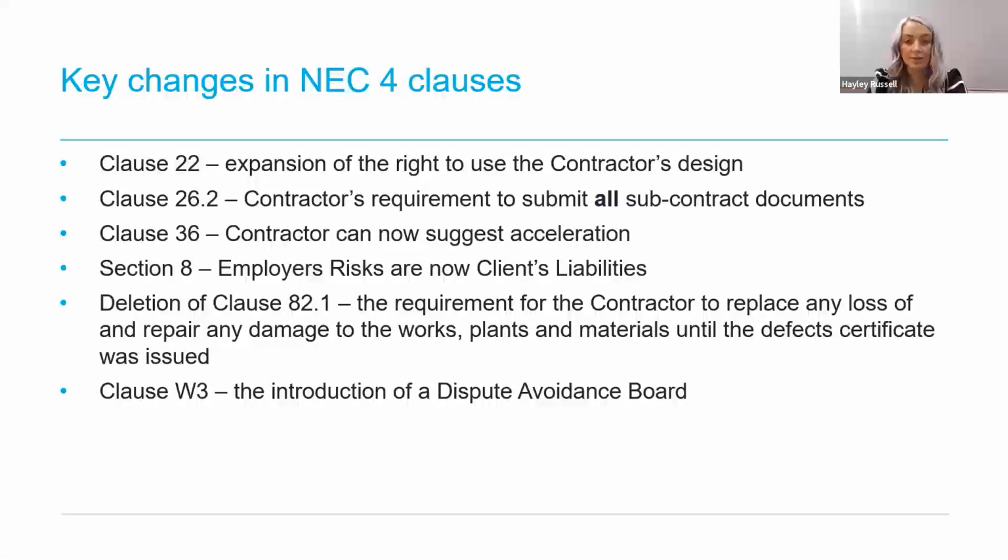Disputes that arise are then referred to the dispute avoidance board, who will discuss the issues with parties and try to find a solution. If it is not resolved, they will propose a recommendation. It is likely that dispute avoidance boards are a luxury that would only be used on projects of certain scale and value. Please note that there are some critical changes introduced by NEC4 that relate to the programme and to compensation events, which we will discuss in our further webinars.